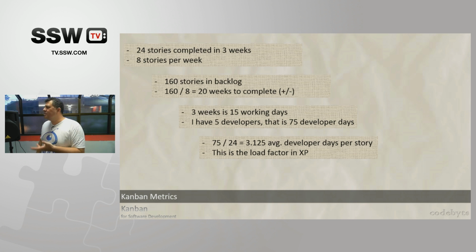And then you can do other stuff too. You can look at your weekdays, how many weekdays you have, how many developer weekdays you have, then you can come up with the load factor, what they call an XP and all that, how many developer working days you need per story and all that. There's a lot of calculations that you can do, and we do it, and it gives you great predictability and great insight into how your process is working.